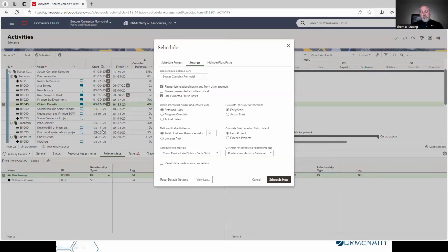And so by using the early dates and the late dates, the scheduling tool can then calculate the total float for those activities, right? So what that's telling me is an activity may be able to start on Monday, but it's not going to impact the project if it doesn't start until Wednesday. So that'll give me that total float. In that case, it would be 2 days of float, in which that activity doesn't have to start. And if it doesn't, then it won't impact the project schedule until Wednesday. So that gives us the total float on that.